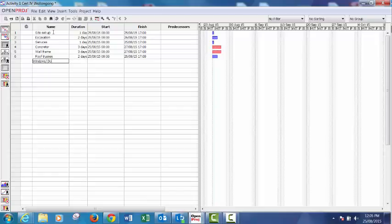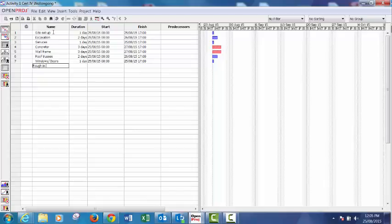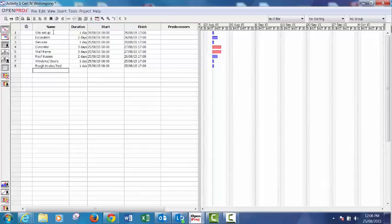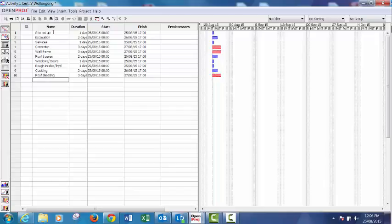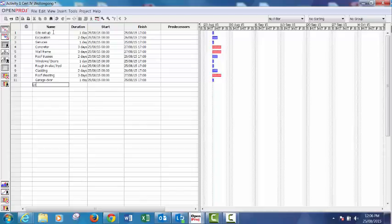Windows and doors one day, hydraulic one day, cladding two days, roof sheeting three, garage door one day, lock up one day.